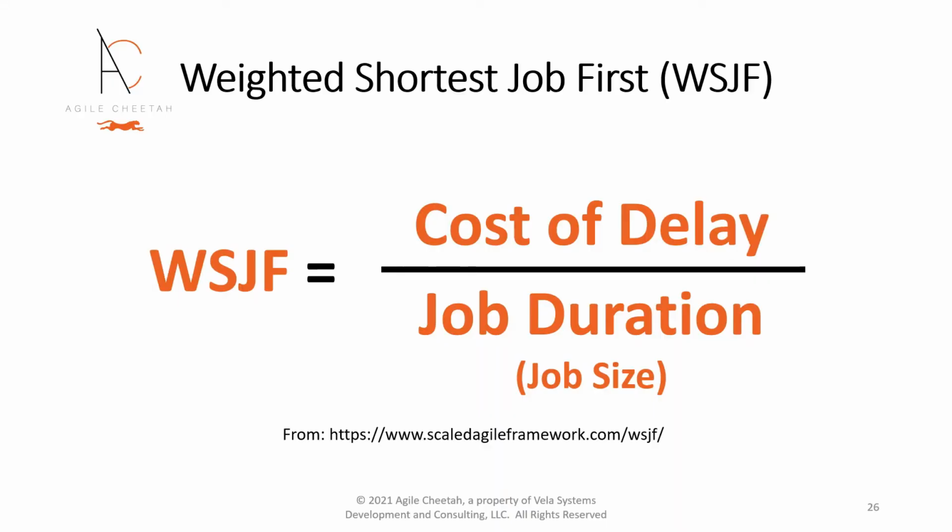Calculation of WSJF allows us to sequence or order individual pieces of work or jobs within a backlog. WSJF equals the cost of delay divided by the job duration. In Reinertsen's more complex version of WSJF, cost of delay is the monetary opportunity cost of waiting to implement and release a feature or capability until later.